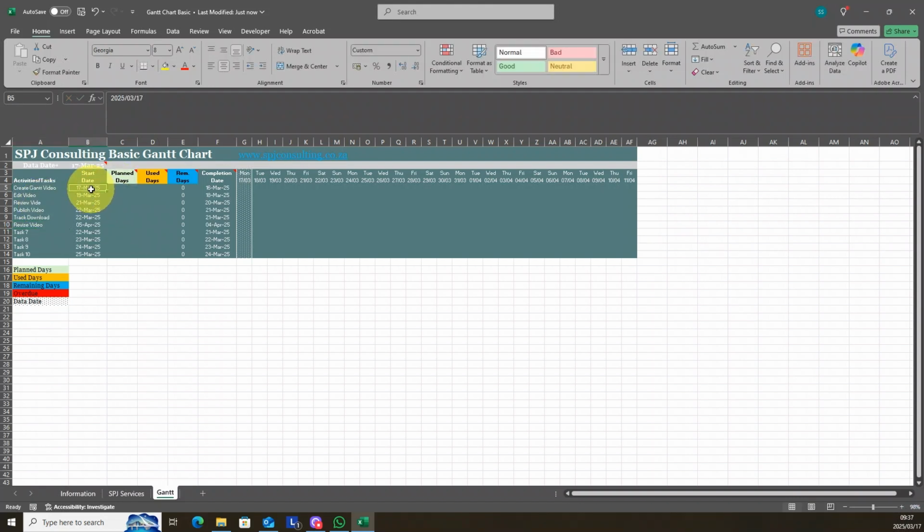I'm planning to start that on the 17th, which is today's date. I'm giving myself one day to do that. I'll give myself 2 days to do that, and of course that can only start after that completion date. So I'll make that start date also the 17th.